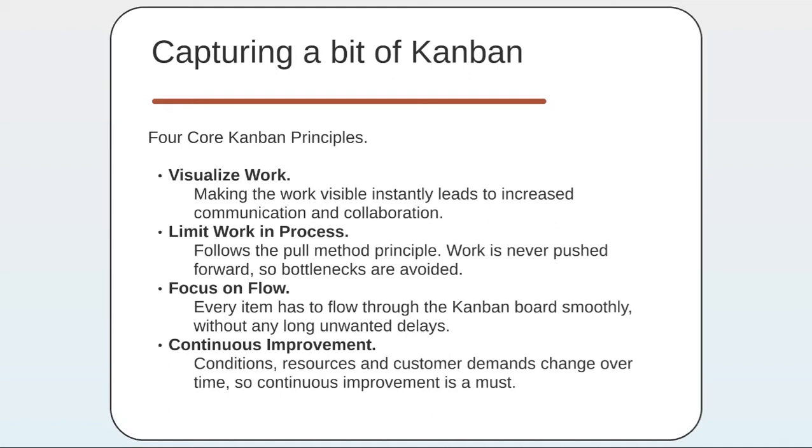In Scrum, we push items to members: we plan them and assign them to each developer and each QA person. But in Kanban, we do not assign PBIs. As a developer becomes free, he takes the topmost item from the product backlog and starts doing it. That is known as the pull principle. This also helps reduce bottlenecks, because a developer will never take a PBI until he has finished what he is doing right now. So there won't be bottlenecks.